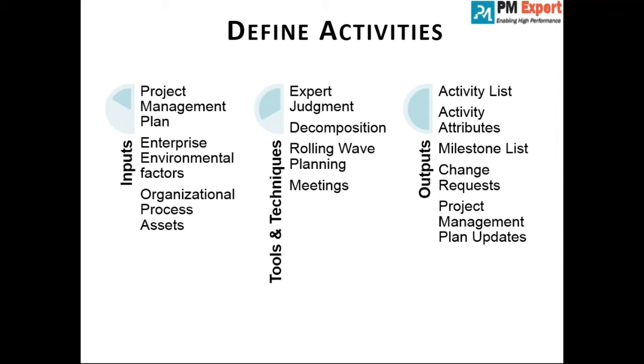Whichever we think is big. I'll tell you, there are various formats of plan, but senior management is not interested in seeing day-to-day activity level tasks. They're least bothered about your Gantt chart. The only version of schedule they would like to see is a milestone chart. If all the key decision points are marked in a project schedule, it's very handy for them. Plus, it's good to have milestones put before and after various critical activities. And I am repeating again, the duration of a milestone will always be zero.